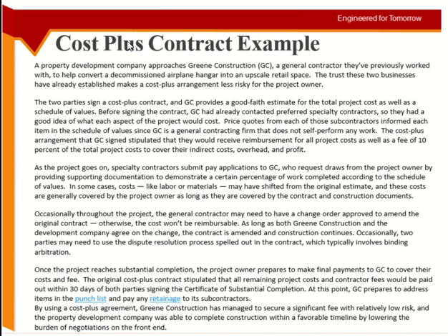Okay, so there are two parties which are signing this contract. One is Green Construction, and the other one, obviously, the project owner, okay? And they are doing it on good faith because they don't know the total cost or duration of the project just now, okay? The contractor has already hired some specialty contractors, okay, who have a good idea about this type of work. So he is not taking the project alone. He is taking it with some other people, but he spoke with them, he asked for their rates and so on. So he is not going in blindly. Okay, this is the point.